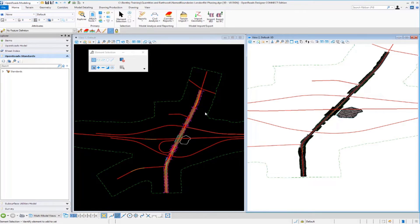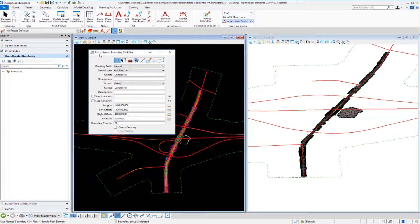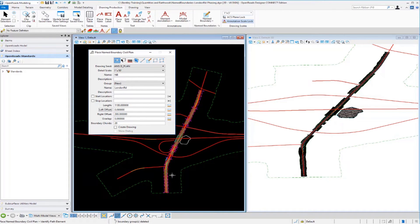First we'll create named boundaries along the northbound side. Going to Drawing Production, Named Boundary, Place Named Boundary brings up the Civil Plan dialog. Selecting the drawing seed and entering NB in the name field, we set the length to 1,100 feet, the left offset to zero since we only want the right side of the road, and the right offset to 200 feet. This creates a named boundary 1,100 feet long and 200 feet wide from the alignment.